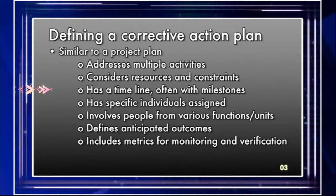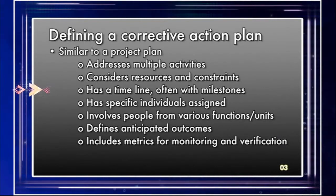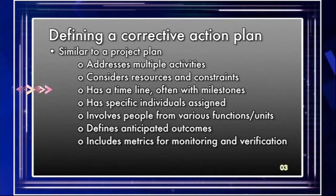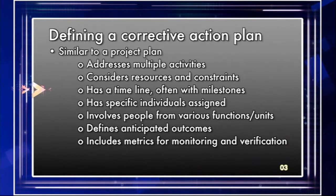You put together a timeline, and timelines should have milestones in them. That allows you to predict when a particular activity can occur based upon whether or not a previous activity has been completed — which is something that a lot of people ignore when they're trying to put together a corrective action plan.